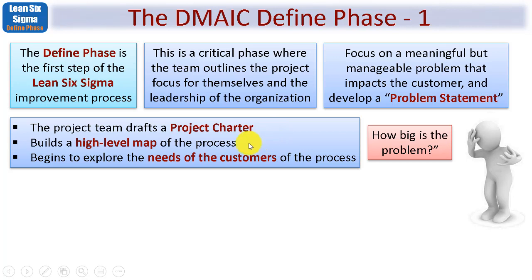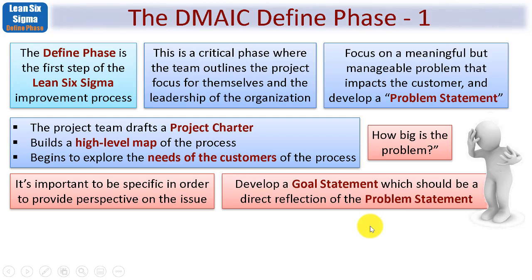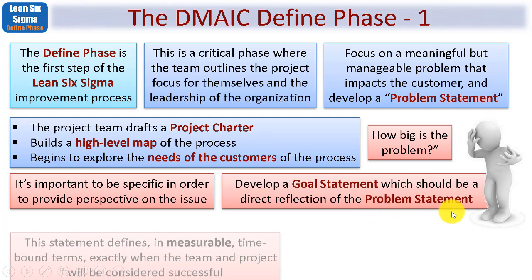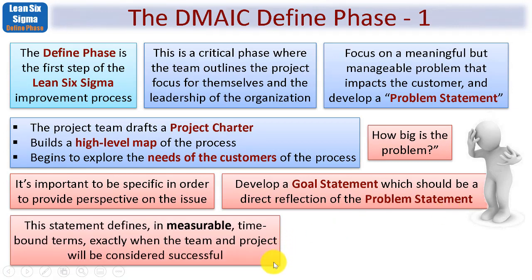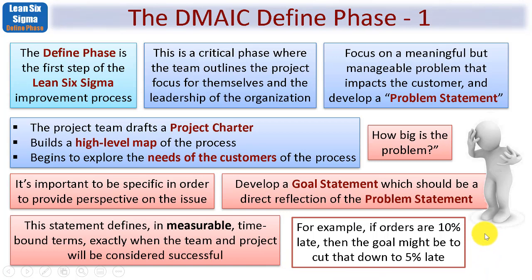The project team drafts or updates the project charter, and a key deliverable is to build a high-level map of the process involved. Remember that Lean Six Sigma is about understanding process problem areas and fixing them, so the first step is to understand the flow of the process under consideration. Within the Define Phase we also develop a goal statement, which should be a direct reflection of the problem statement — defining in measurable, time-bound terms exactly when the project will be considered successful. For example, if orders are 10% late, the goal might be to cut that down to only 5% late.